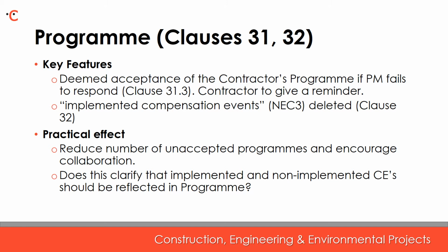And so the practical effect of these changes is in relation to the deeming provision, so reducing the number of non-accepted programmes. The NEC and compensation event process are reliant, as you know, on an up-to-date programme being implemented, and so it's hoped that this will increase the pressure to collaborate to agree changes to the programme promptly and efficiently.